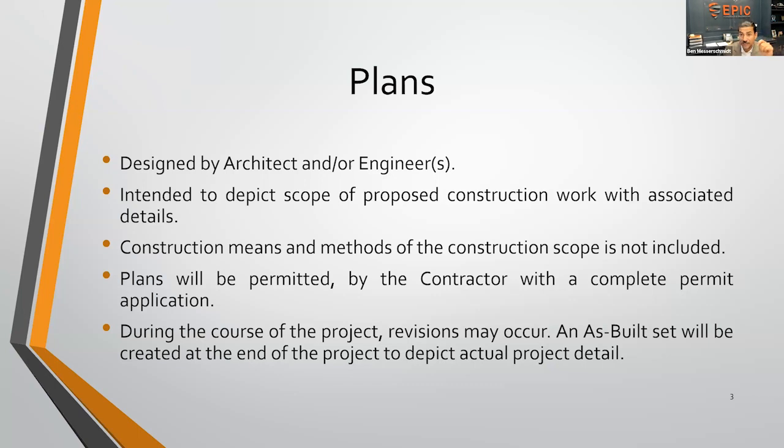And if there's any DERM aspect of anything, then they might have to get a DERM permit as well. It is up to the contractor to complete that permit application. So it's going to be 1 or 2 sheets. The contractor is going to fill it out. It will have some coordination with the engineer or with the designer as far as providing original copies of plans, maybe any special inspector forms. There'll also be some owner obligations, and owner will use that as a community association in this example. So whether it be any funds or any payment, or identifying certain personnel, things like that, but it's all stipulated on those general forms that you can download from their website usually.